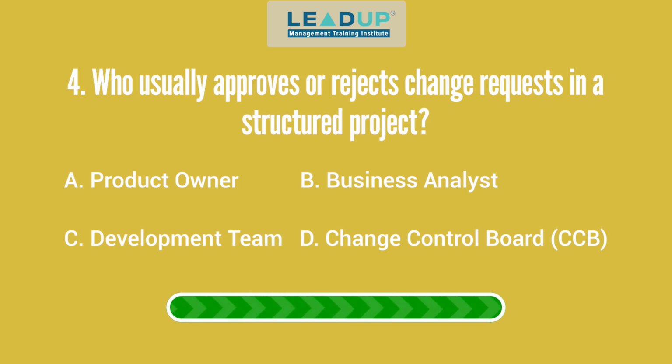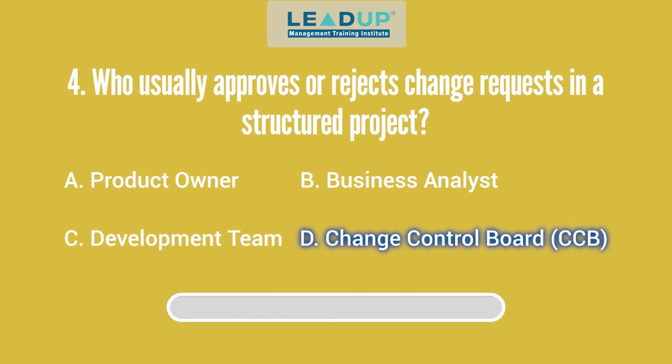Question 4. Who usually approves or rejects change requests in a structured project? A. Product owner. B. Business analyst. C. Development team. And D. Change control board, CCB. The answer is Change Control Board, CCB.